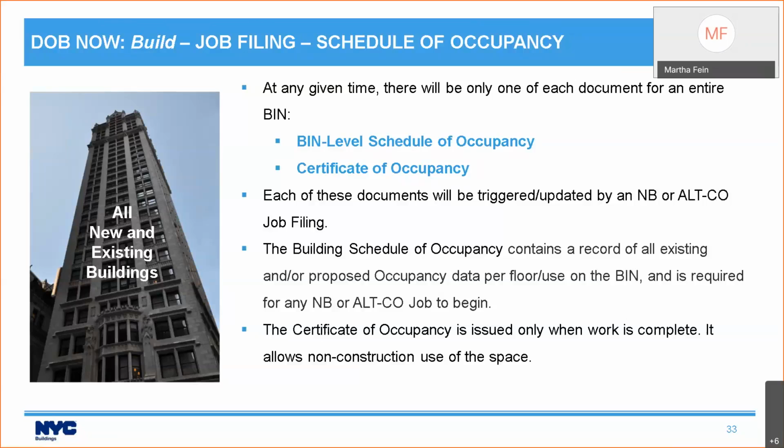We'll talk about floor use in just a minute, but I still want to go into some stuff about how the schedule of occupancy works. The certificate of occupancy, of course, gets issued only when work is complete, and it allows for non-construction use of the space.